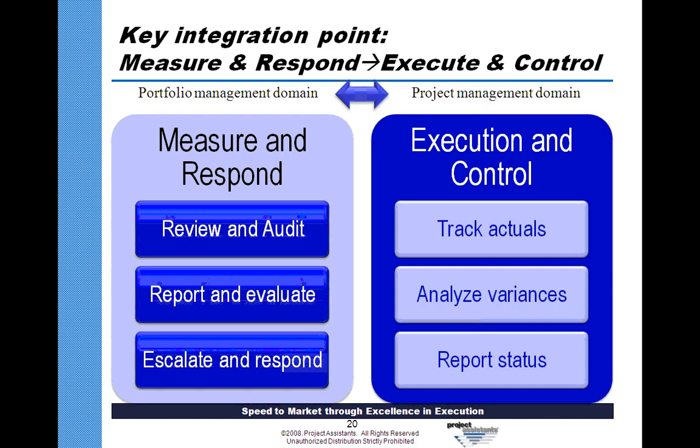If we're in a construction management world, do we need to acknowledge that there are more rocks in the way of the foundation and the excavation is going to take longer? If we're in the pharmaceutical development world, do we need to acknowledge that patient registration isn't occurring at the rate that we hoped it would? If we expected first patient in and last patient out to happen in 6 months, and we don't even have half the registrations that we need, and we're at 6 months, at what point do we really go back to the portfolio governance world and get aligned and get realigned?